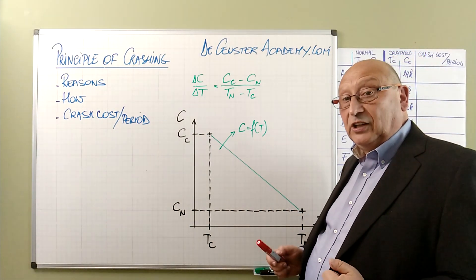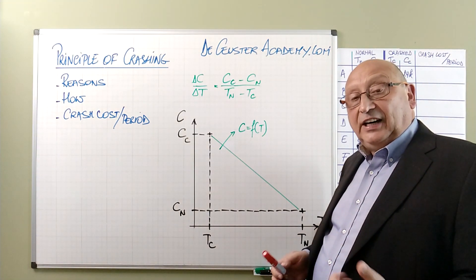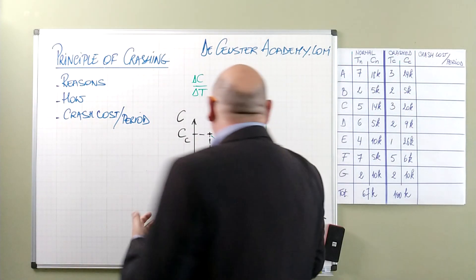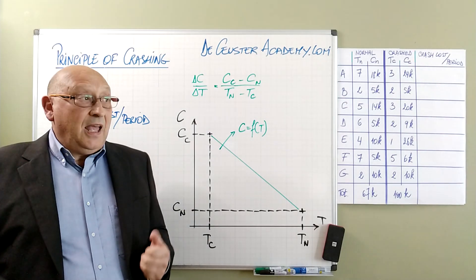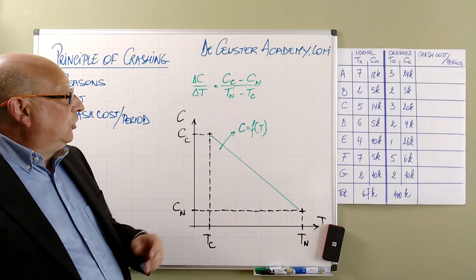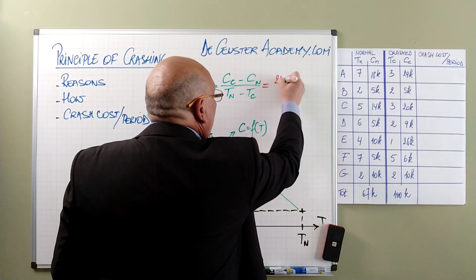This is in fact the slope of this slide, and using this formula we can calculate the crash cost per time unit for all the activities. Let's have a look at some of those activities. First of all, we have activity A.